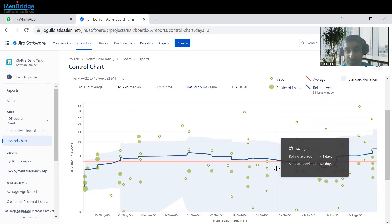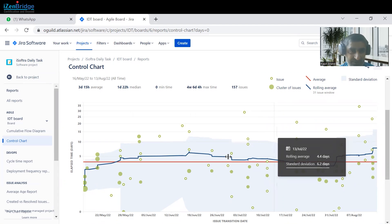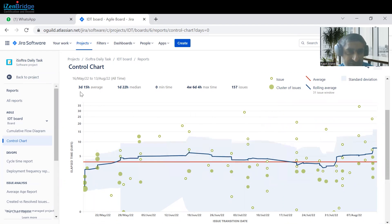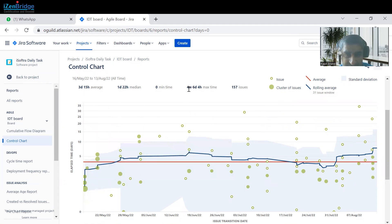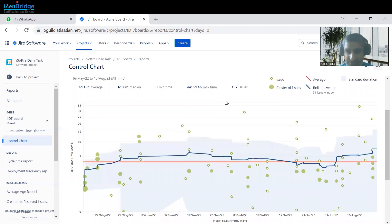The average time to fix those issues or to move the status into the done status is three days and fifteen hours. The maximum time taken by any issue is four weeks, six days, and four hours. Overall there are 157 issues, so it's a good amount of data available to show you what this chart is doing.